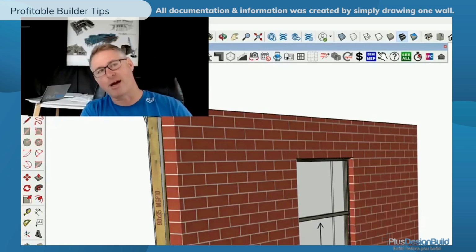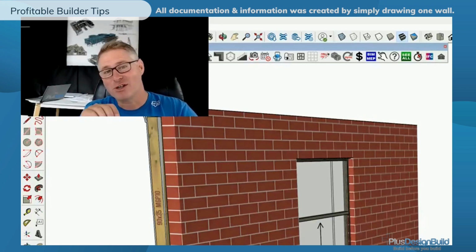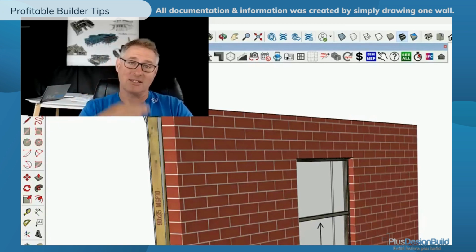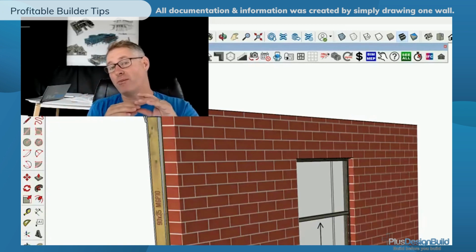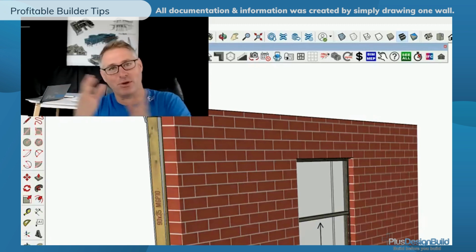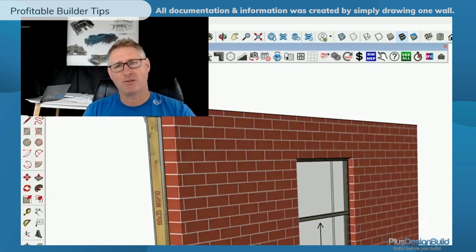So a purchase order linked with an invoice from a supplier enables you to see exactly where either you missed something or exactly where you're losing money. If you're using cost codes, it makes it easy to segment those items and say, oh wow, I lost or I made money in these stages of the job. You can either refine your margin where you made more, or you can go, I can take some from that and put it to that because I've made a mistake. So it's a little bit of swings and roundabouts.